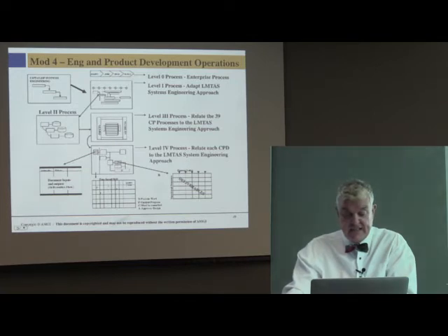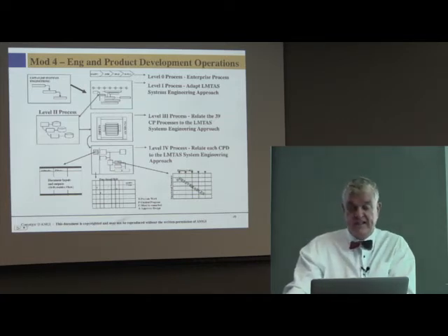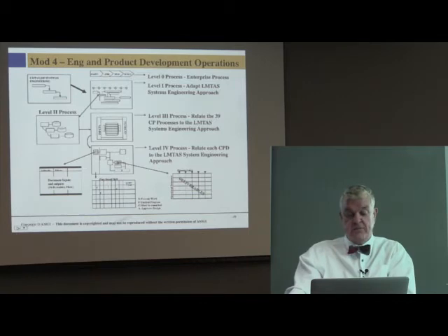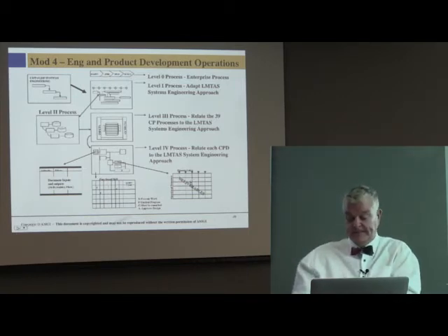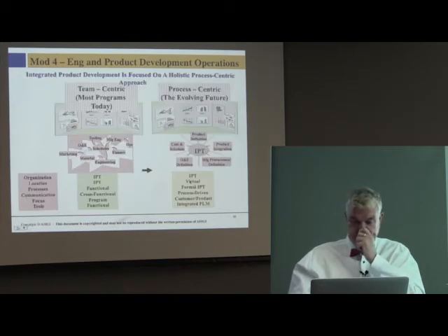But essentially you had these functional processes and the gates, these milestones, and you had produced deliverables, and you had to make sure that they were aligned, each of the deliverables from the different groups was aligned so that you could go to the next gate. That's the stage gate process.